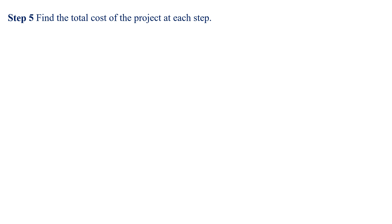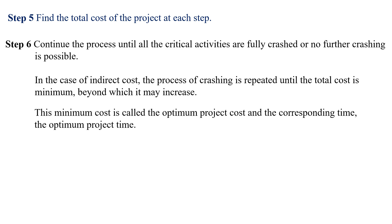The next step is to find the total cost of the project at each step. The last step is to continue the process until all the critical activities are fully crashed or no further crashing is possible.